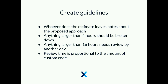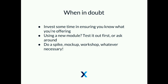When in doubt, it always helps to spend some time trying to find out more information. Often devs will say, 'I think this module will do what we want, but I've never used it before — can I spend two hours installing it and seeing what it does?' And of course, please spend two hours, because if you spend two hours up front, that might save you from spending 40 hours down the road because your estimate is more accurate. I have one dev who always asks me for a design, and it drives me crazy sometimes, but he's almost always right. It's really important that your developers feel comfortable challenging you and asking for that extra information, even if sometimes you might give them grief about it.